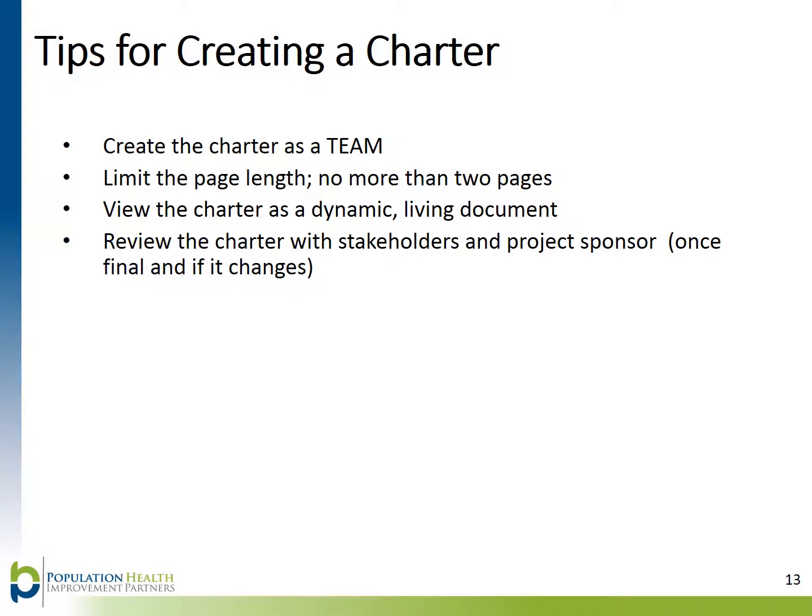Finalize the charter and ask all stakeholders and the project sponsor to approve it before launching the project. This will ensure that everyone is on the same page. It is important to review the final charter with the sponsor in person in order to answer questions and clarify assumptions. If at any point the aim, timeline, scope, etc. changes, it is important to review the changes with stakeholders and the sponsor to get their approval.